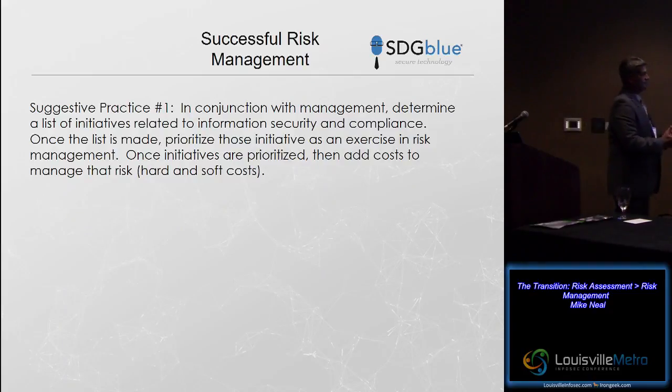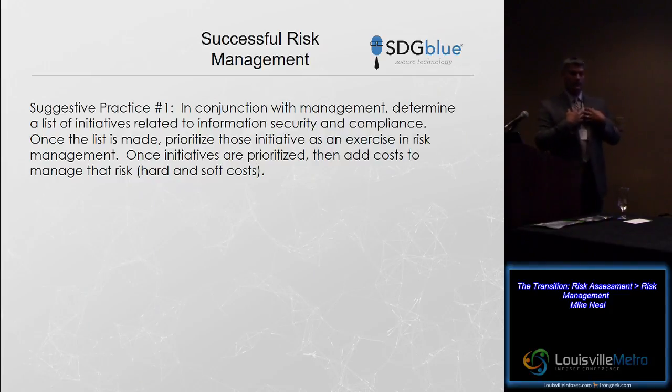I'm going to talk a little bit about some practices that I utilize with clients, and it's been pretty successful. In conjunction with management, determine a list of initiatives related to information security compliance. Prioritize those and work with the client, in my case, from your side, internally, work with your internal stakeholders to say, what are the most important risks on this list for us to remediate?